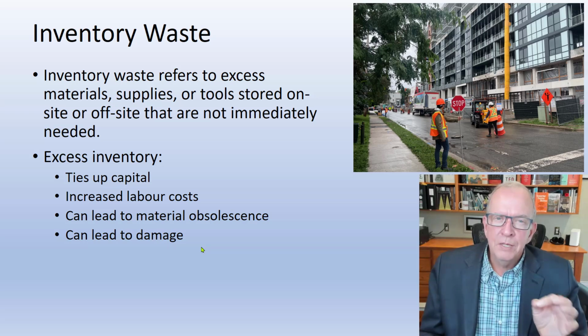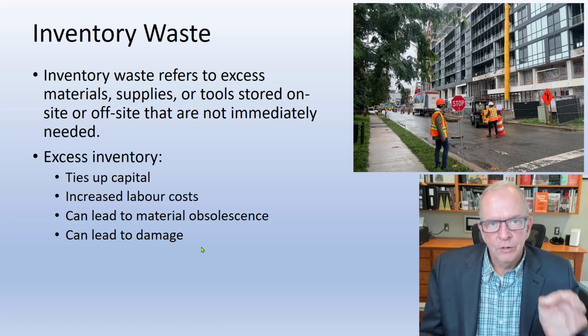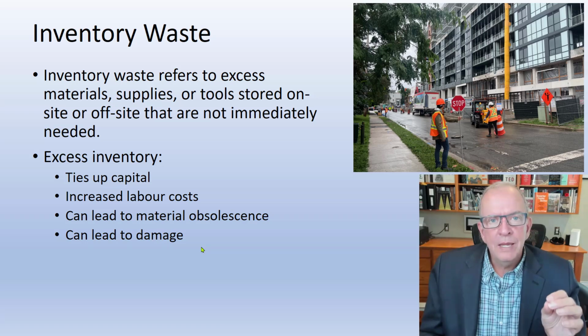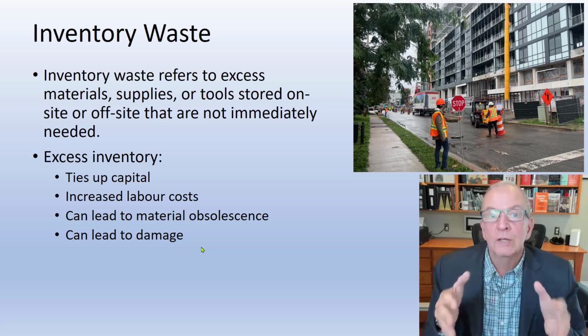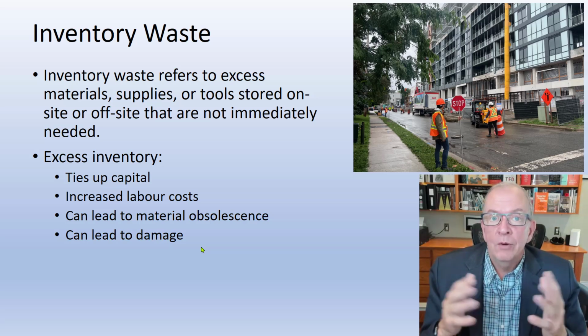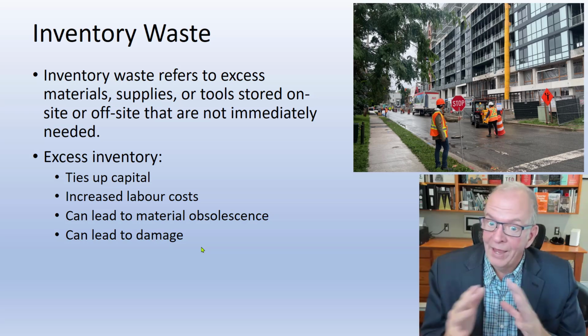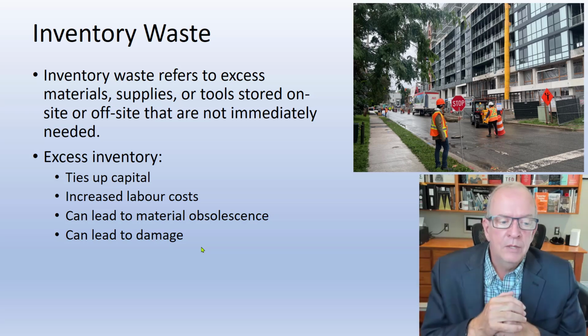Or maybe it's a piece of equipment that needs to have a certification every so many months, and you've had it there longer than those months. Maybe it's a warranty issue, that the warranty starts when it was delivered to the site, and now it hasn't been installed for 6 months to a year, so there's hardly any or no warranty left on it. These are things that can come into play.